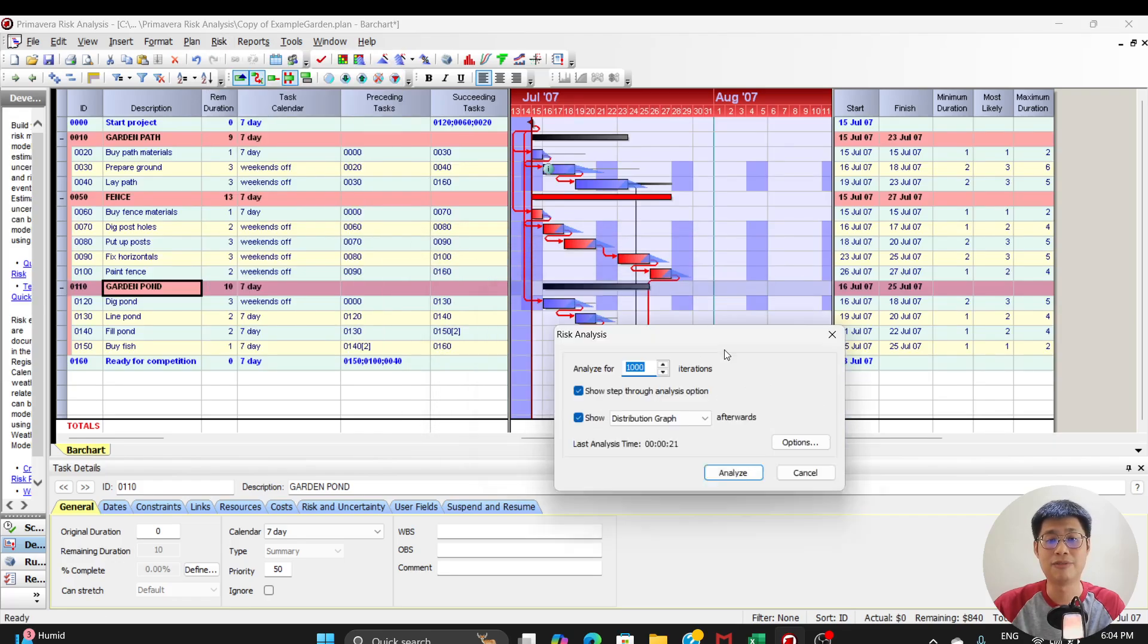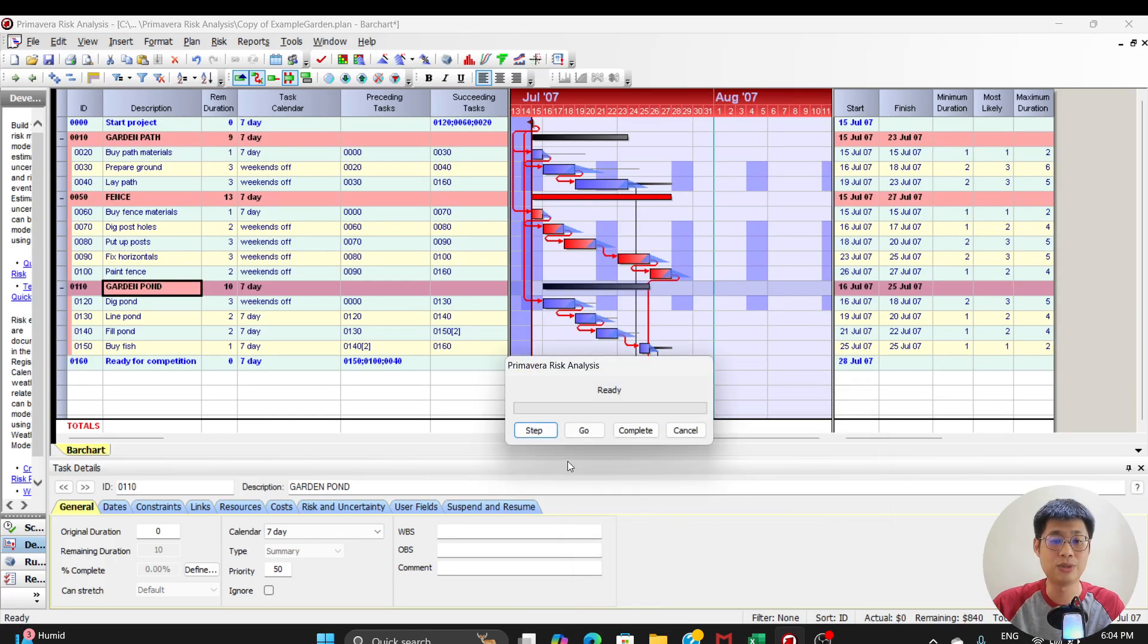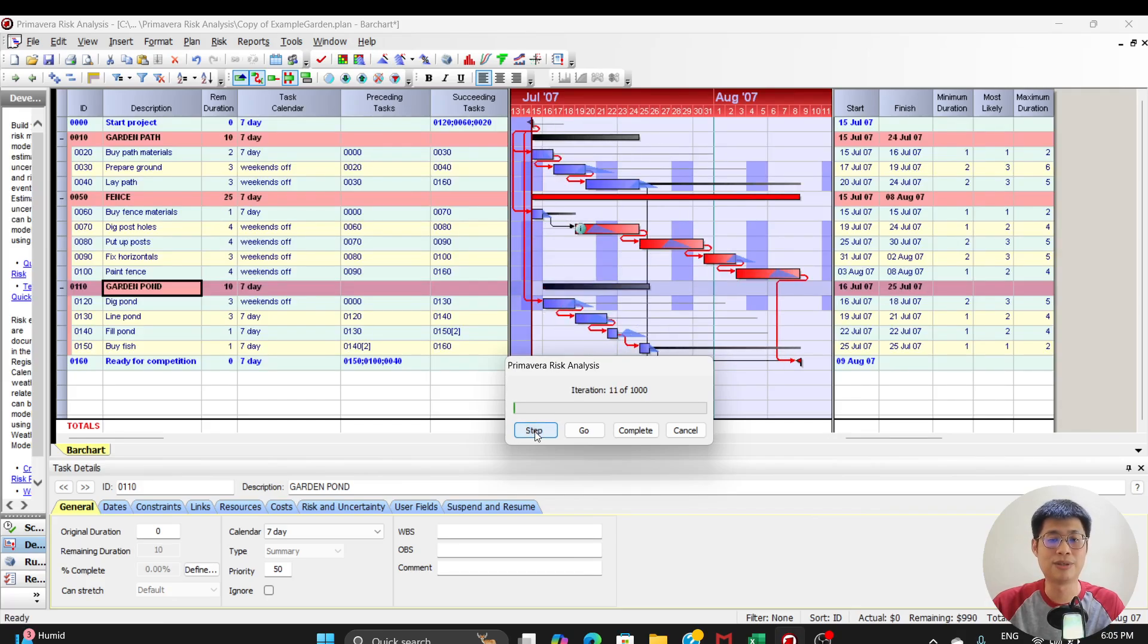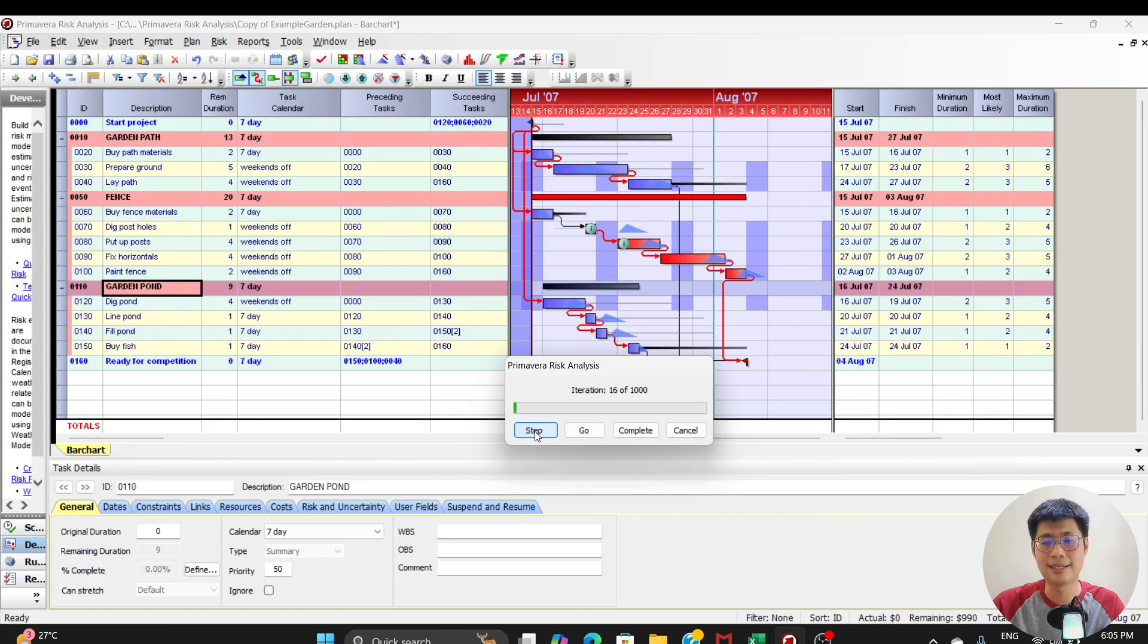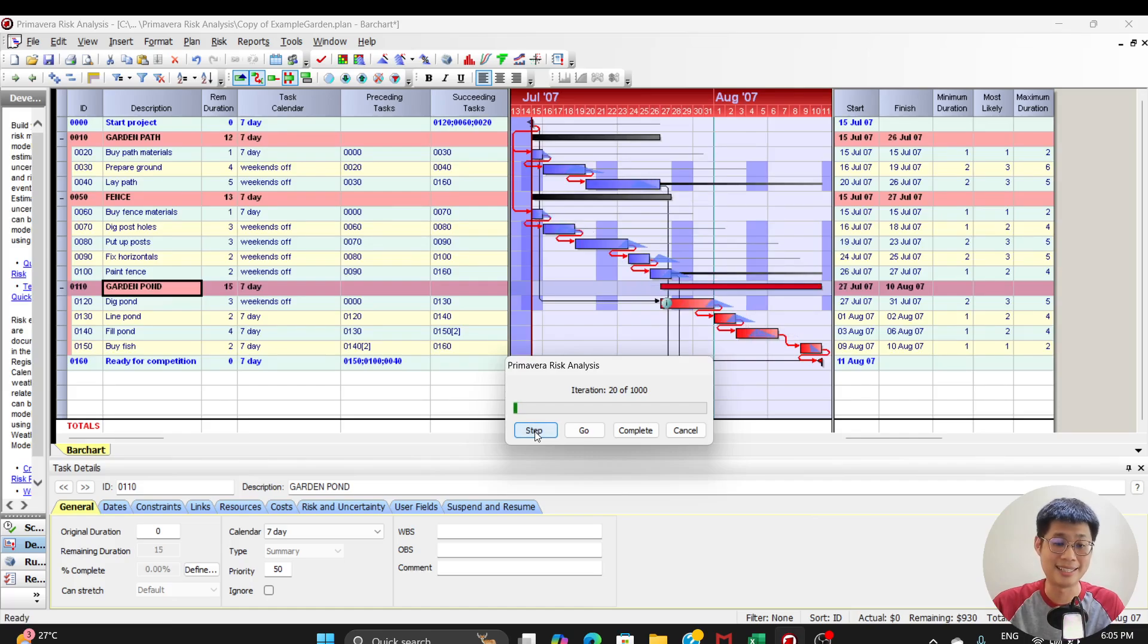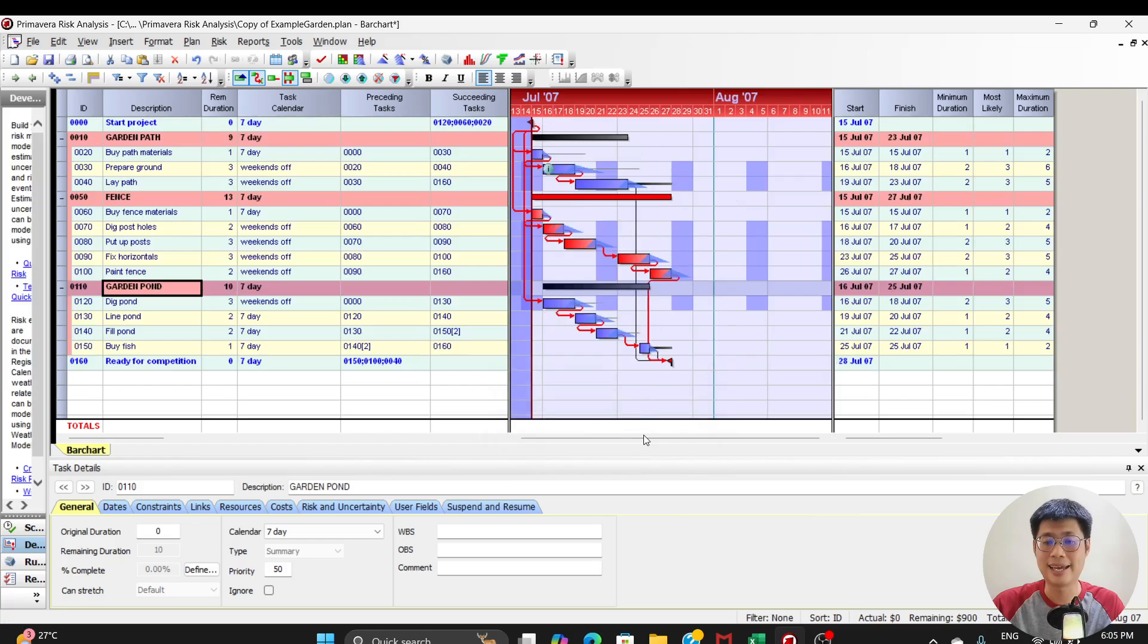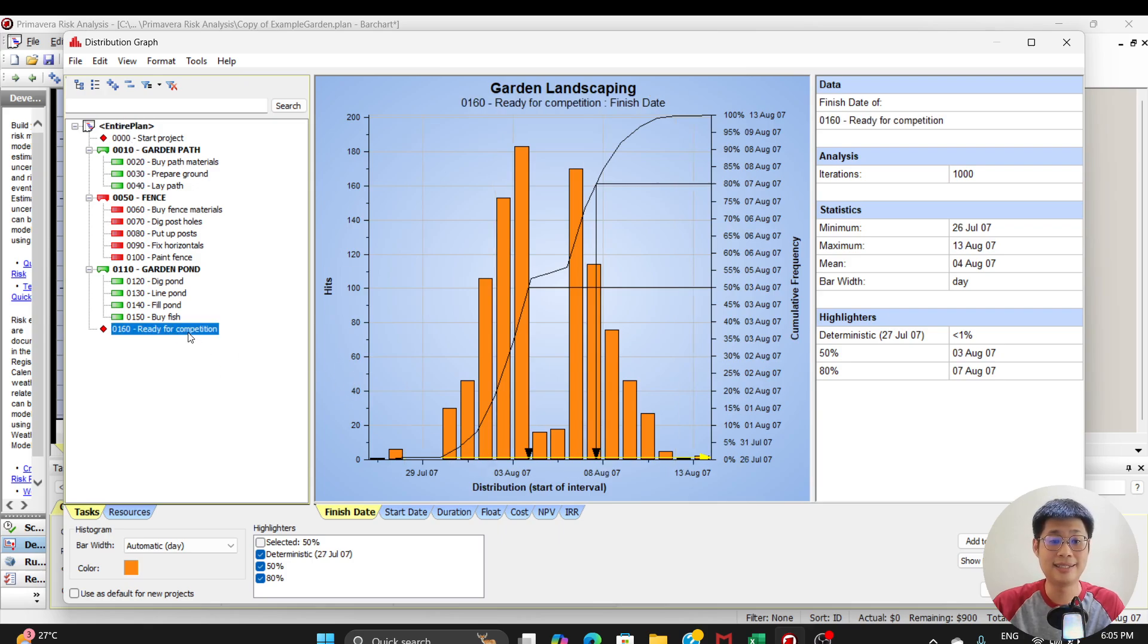So if you have a schedule that is wired up, meaning that you've defined relationships between the different tasks, you've got kind of definitions of non-working periods, you are able to do the same thing where you can roll the dice multiple times and just see what happens to the final result. So this is one level more complex than a cost risk analysis. Because you are trying to do project scheduling at the same time. But ChatGPT supposedly has a PhD level intelligence. So I wanted to see to what extent it can replicate the results.